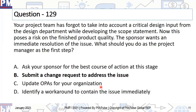If you just update the OPAs of your organization, how is that really going to help? Your project team has forgotten to take into account a critical design input from a design department while developing the scope statement — somebody has to figure out how much impact that has caused. Is there a second phase where we can do this, or is it part of this particular release? A lot of decisions have to be taken, so it's best to submit a change request to the CCB. Instead of a knee-jerk reaction — stopping all work right now — let's find out how to do it properly. Asking only your sponsor is not ideal since there are other stakeholders connected to the CCB. A better answer is to submit a change request to address the issue.